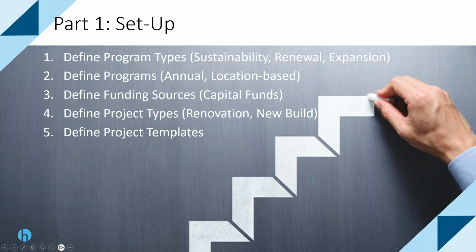And then, of course, for the project management itself, you want to know project types, the types of projects that you run typically, whether it be renovations, new builds, assessments, moves, whatever it is that you're trying to manage. And I think the nice thing about Archibus is you do also have something called a project template, so that when you go and request a new project, you don't have to fill out all of the details, all the contract packages, all of the individual action items every single time.